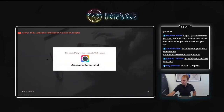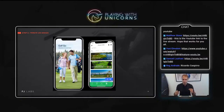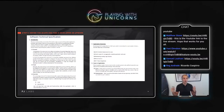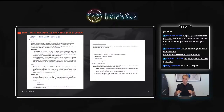Once you have a design you're happy with, get a technical specification out and get developers to propose to build it for you. The next thing to do is write what I call a software technical specification document, which covers what we're doing, the scope of the project, who the users are, and walks people through the user stories. For the user side it's rather easy since you attach the entire flow. But you also need to think through the administrator side — someone who can do curation, delete profiles, approve profiles, maybe edit the database, et cetera.